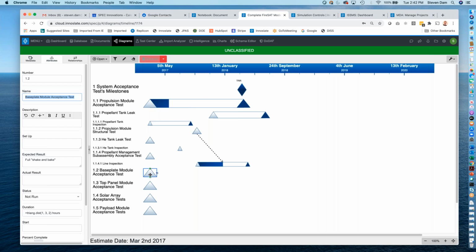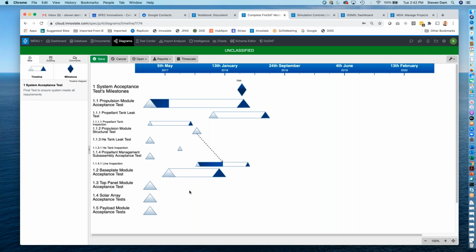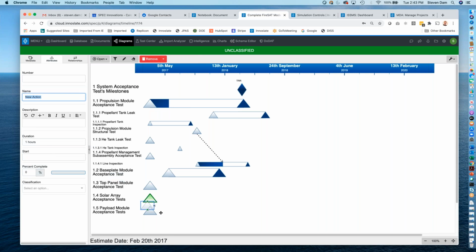As you want to adjust the timelines, you just simply move it to the start date, and you can see at the bottom left corner is showing you the date. And then once you're happy with that, you just extend it out to where you want to go, and you see the end date, and you're done. It's that easy to adjust those. To grab a new timeline in, if you need to, you would just simply grab it and put it up underneath this and drop it and put it to a lower level. Okay.